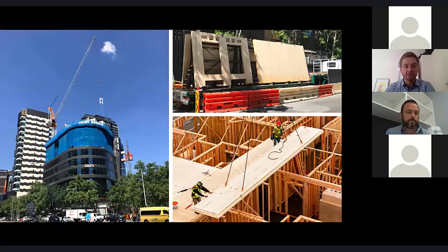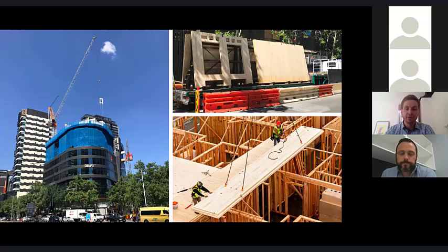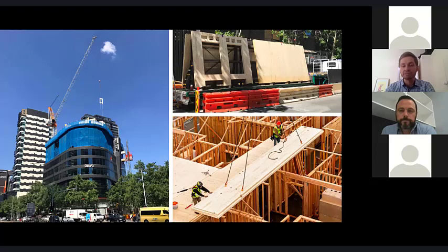Yeah, I'll just go back to your point earlier. I totally agree. It's not something traditionally done by the engineer early in the design, but I really think it needs to be, with the whole sequencing and panelisation of these. More often than not, it's left totally up to the supplier to bring that in, but it does have significant design impacts, and I think it's important for engineers to be involved in those conversations and for it to be part of their scope of works, because we know how much we worked on 55 South Bank, for example, with the sequencing and everything, and I think it adds a lot of value.